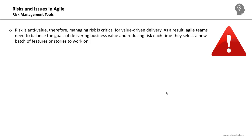In Agile, risk can be defined as anti-value. In Agile, there is no threat and opportunity — a risk is only a negative event, a threat. And because it's anti-value, managing risks is critical for value-driven delivery or agile environments.